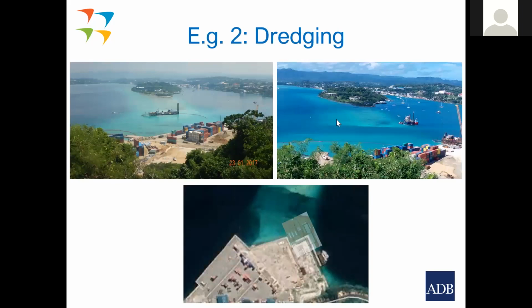Okay, so just a second example, dredging. Let's examine dredging. This is the activity with the most impact. We went from the activity with the least impact for this particular project, site clearance. Incidentally, for greenfield projects, site clearance is often where the biggest impacts occur, because the contractor will rush into the site and clear everything and want to start work.